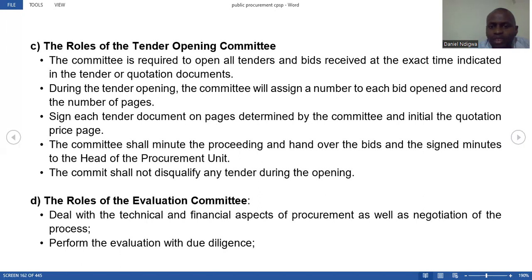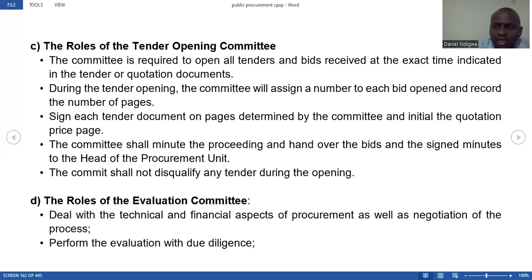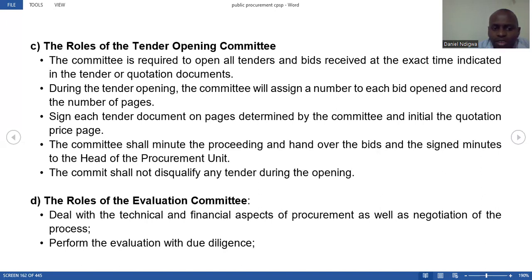They sign each tender document on pages determined by the committee and initial the quotation price page. The committee shall minute the proceedings and hand over the bid and signed minutes to the head of the procurement unit. The committee shall not disqualify any tender during the tender opening — they receive all tenders regardless of whether they meet the criteria set.